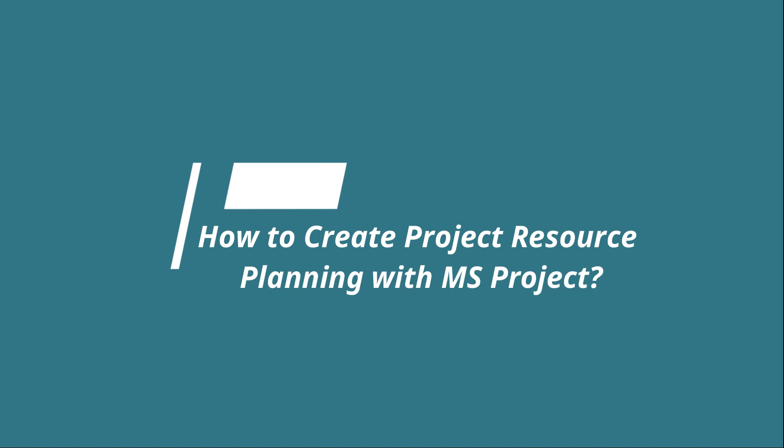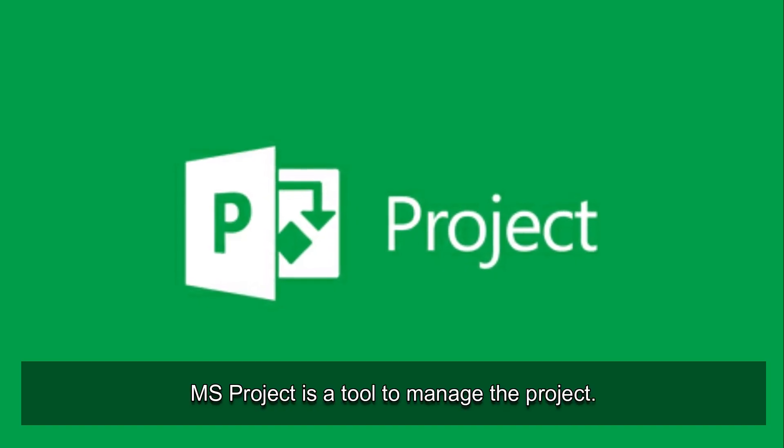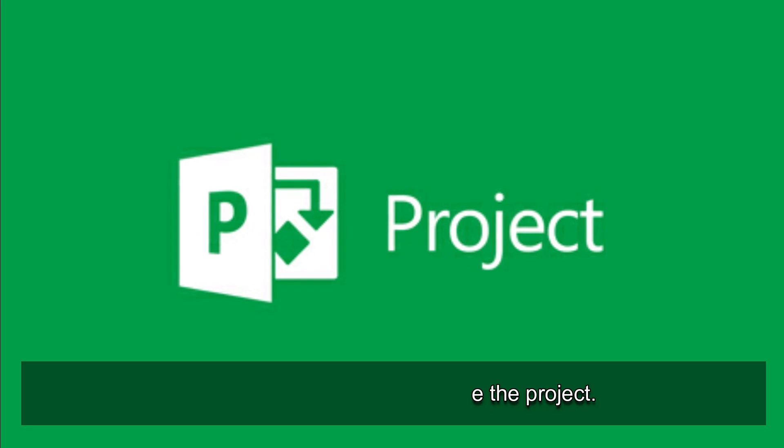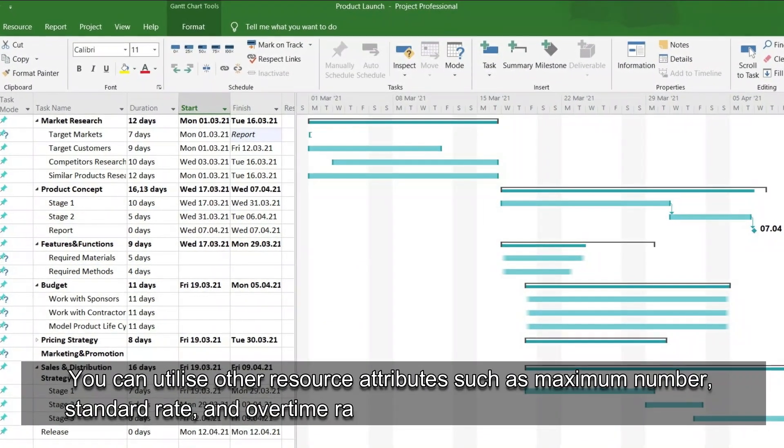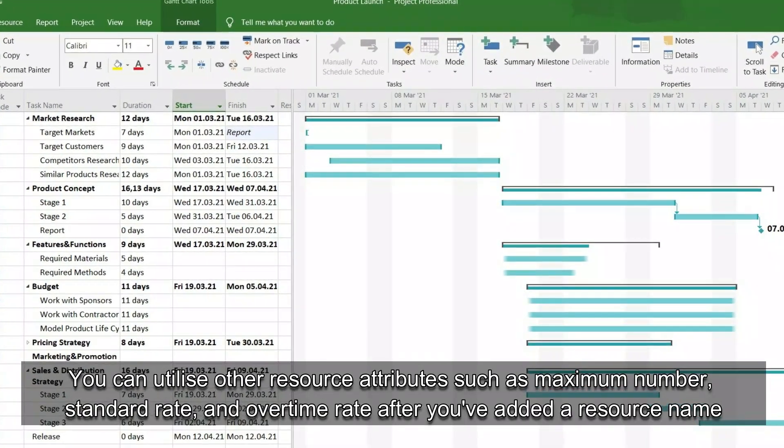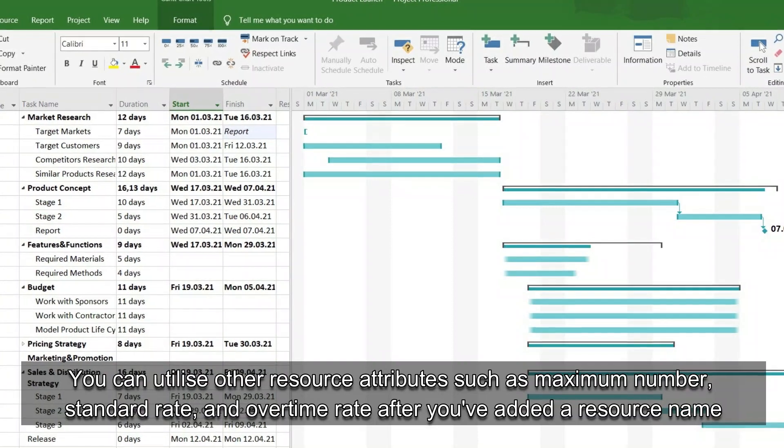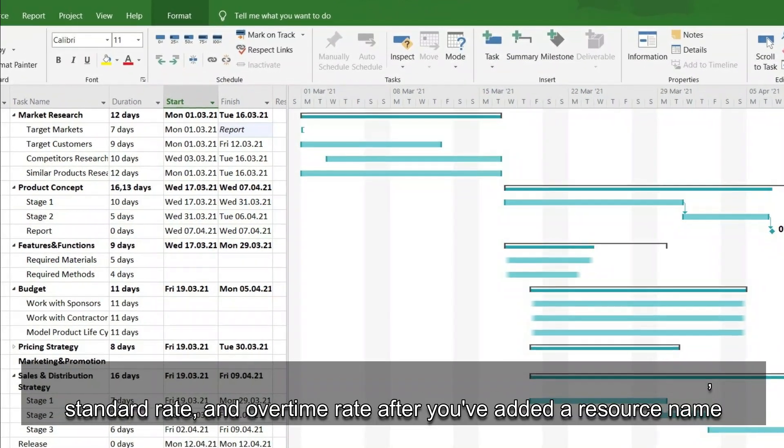How to create project resource planning with MS Project? MS Project is a tool to manage the project. You can utilize other resource attributes such as maximum number, standard rate, and overtime rate after you've added a resource name.